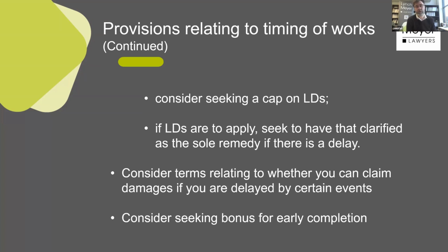Of course, there's the flip side of the coin where you can claim damages if you are delayed. Obviously, the basis for you claiming delays is usually a bit harder than the other side claiming delays against you. But I sometimes feel like that's a forgotten aspect of contracts, is you can actually claim delays. If you're delayed, you can actually sometimes claim delay damages. Often you'll see in contracts that that's excluded, so you can't claim delay damages, but turn your mind to that. And in contracts, we're seeing bonus for early completion. I often see that removed from contracts, but consider whether you think that that's something that should be there, because if you complete early, that could create a benefit for the other side. So it could be a win-win type situation.